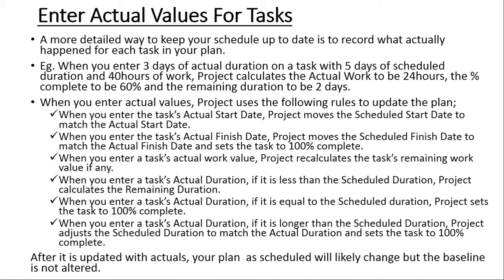You can also enter the actual duration, and if you enter an actual duration which is less than the scheduled duration, then Project will calculate the remaining duration.